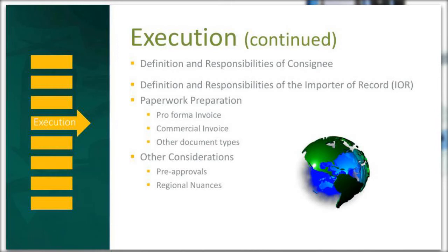An example would be you have ancillary supplies containing batteries that were manufactured in China. Some countries will request these batteries to be removed from the ancillary supply prior to exportation because their country's import laws and regulations don't allow it, or the licensing requirement is too involved and they don't want to pursue one.